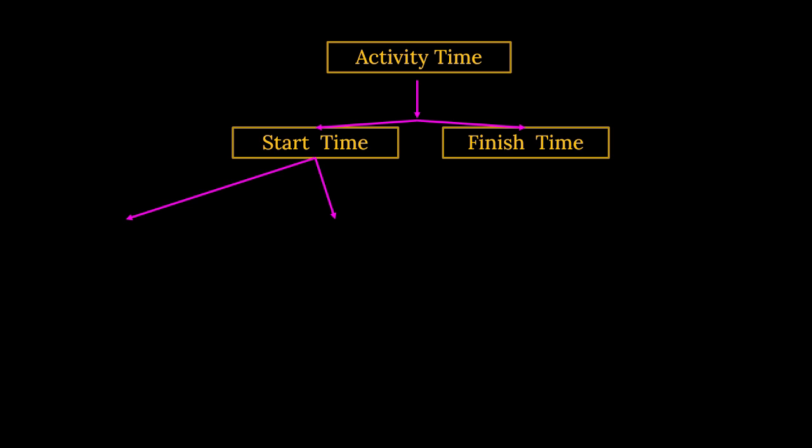But how much have you been given? 7 days. Fine. That means you can start in two different ways. Within 7 days the work has to be completed. You know that it will take only 4 days of your time to complete. So once you get the job, you can start the work immediately on day 0 and work continuously for 4 days and get the job over, and the remaining 3 days you can rest and enjoy.